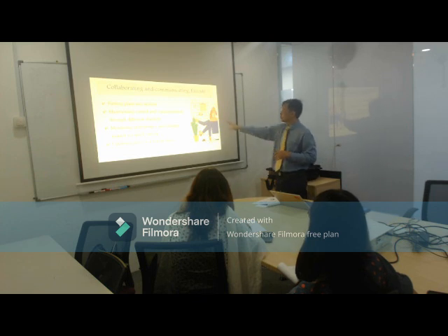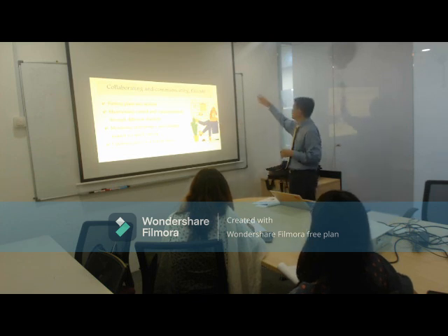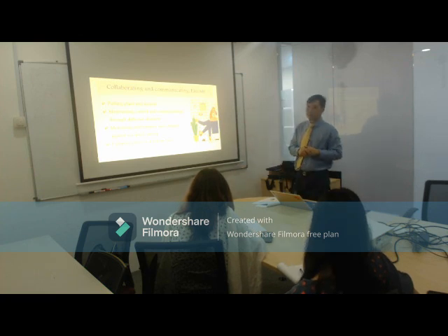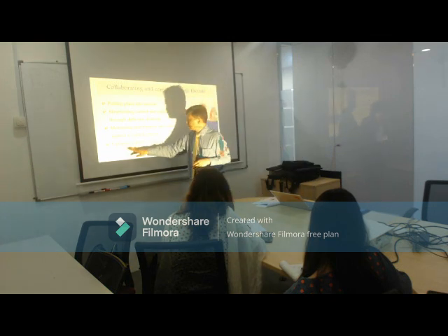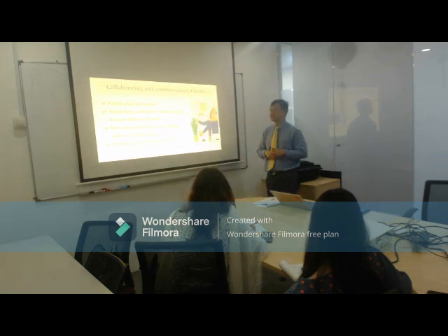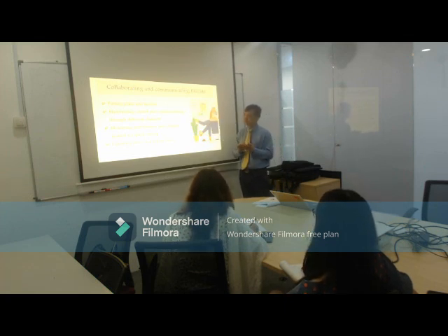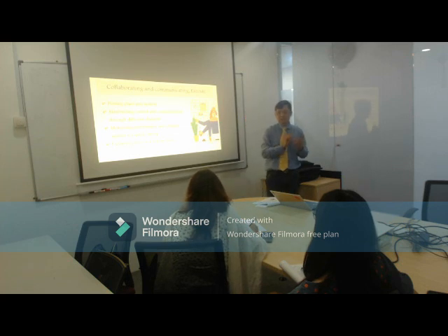Another criteria I could also place is the paint must be evenly painted. I don't want to see one patch here, one patch here, one patch there. Yeah, so those are examples of criteria. Updating plans on a regular basis. Project manager will have to speak to them to say, oh, is this okay or not? Okay or not? Yes. He will update his timeline, his plan.